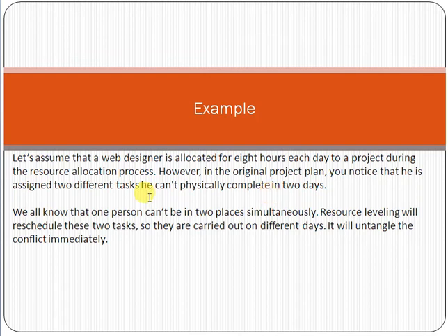So what can you do? We all know that one person can't be in two places simultaneously. Resource leveling will reschedule these two tasks. Rescheduling means that you are changing the starting and ending dates so they can be carried out on different days. It will untangle the conflict immediately. So that is the concept of resource leveling here.